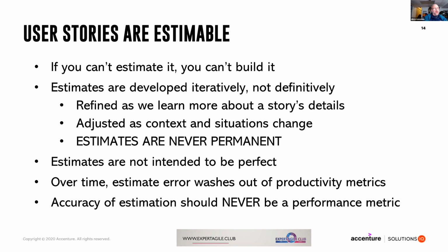Also, once we start learning about a story until we stop learning about a story, context and situations change. Sometimes customer relationships change. Sometimes team structures change. That's why we say estimates are never permanent. The only time that they're absolutely permanent is after the story is done. After the story is done, we never update that estimate.